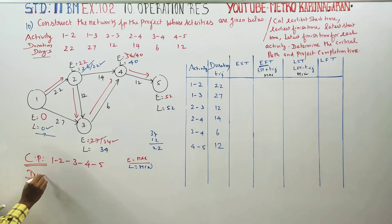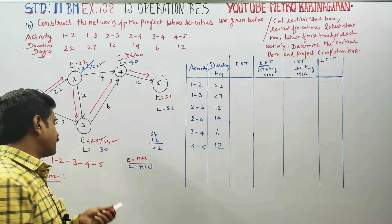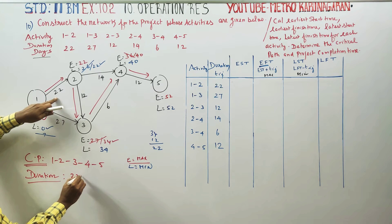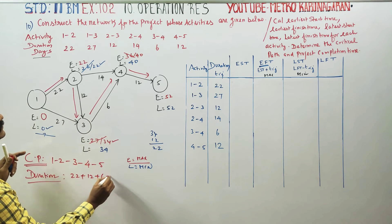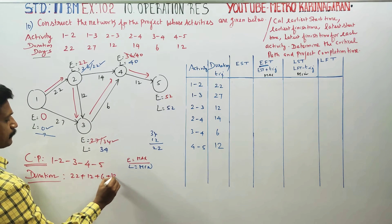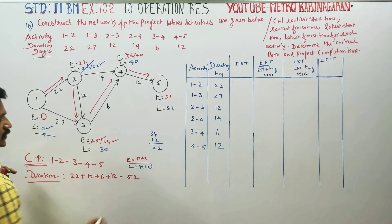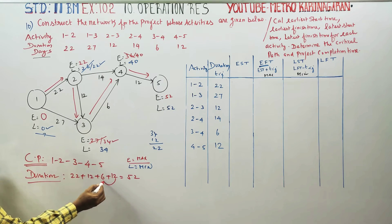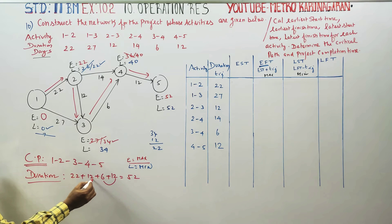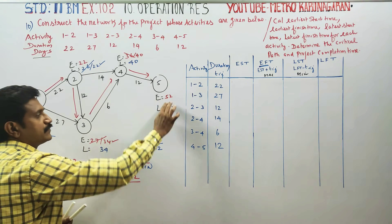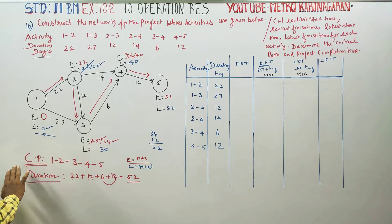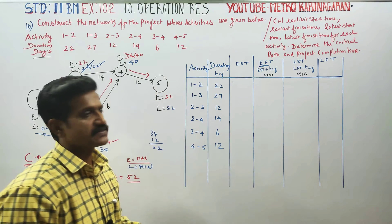Project Duration, or Project Completion Time, is 52 days. The critical path runs through activities 1→2→3→4→5 with a total duration of 52 days.